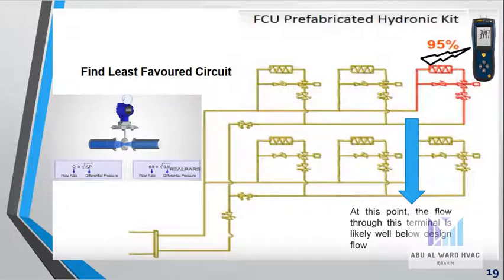Let's take an example for a system with many circuits. We will first define the furthest or least favored circuit, which may suffer from less flow due to the distance from the pump. We can use the differential pressure gauge to measure the differential pressure, thus we can get the measured flow in this unit and divide it by the design flow. Because of less flow here, we can get 95% of R value. At this point, the flow through this terminal is likely below design flow.